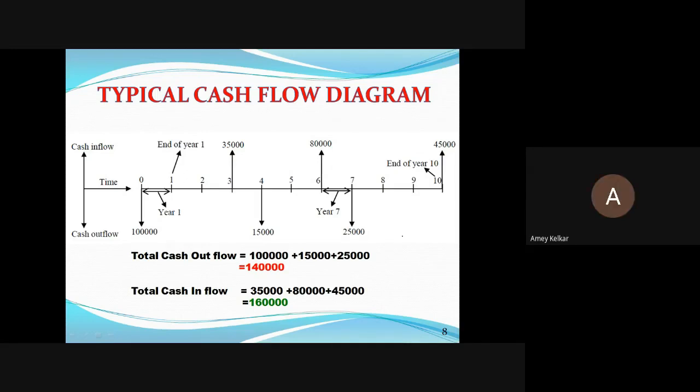Fine, good. So now what happens here is, if you have deep foundations, then at ground level itself, when you go for foundation work, you have a quite heavy cash outflow compared to your simple or regular footings. Then once you come up to the plinth work, as a plinth doesn't have any slab, you start with your RCC work, and your cash outflow starts. And when we come to the slab level, as Shabaz said, you'll require the highest cash outflow.